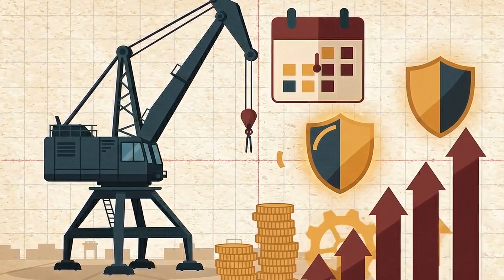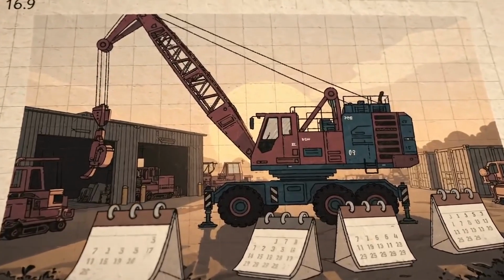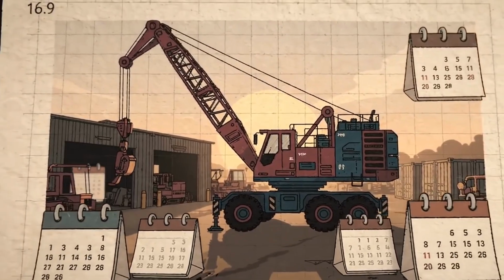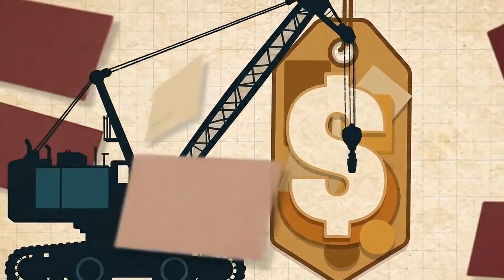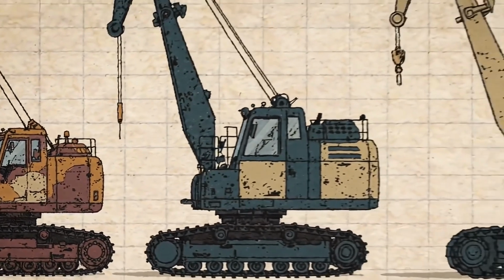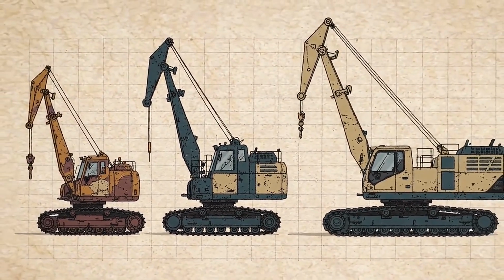That is a safety rule. It is also a business fact. If a site needs work before the crane can operate, part of the cost of using the crane may appear somewhere else in the project budget. A 2025 ALL bridge project in Tampa gives us a concrete example. In that case, the erection contractor, V&M, performed ground preparation before the crane was positioned.